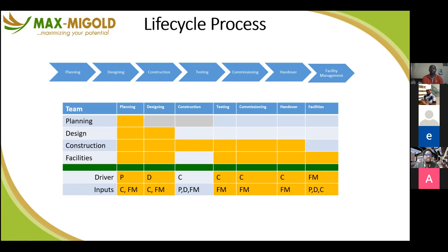If you now bring in 500 people into that hall, that AC will still be working as it was working before. In fact, working more now because the compressor will not go off again, because to reach saturation point will be very difficult because of the number of people you have in the hall now. But your commissioning is checking if that AC can meet the requirements of the people in the hall. And if it cannot, the commissioning has failed.